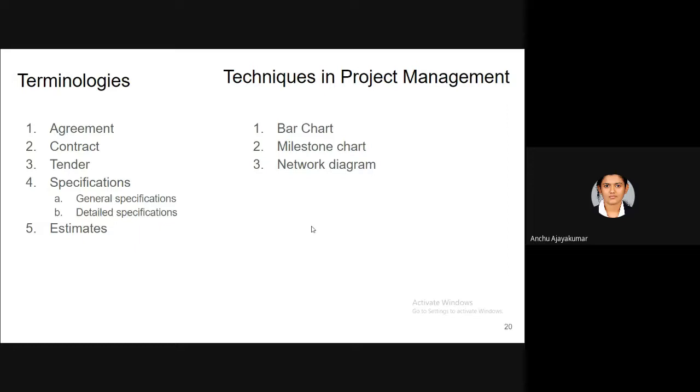So what do we do? We do a milestone chart, as an improved version of the bar chart. It has the same x coordinate and y coordinate: x represents the time and y represents the activity, but y represents the milestone activities only. After that, it is also difficult, because with milestones, sub-activities or interconnections between the activities, nothing is able to connect.